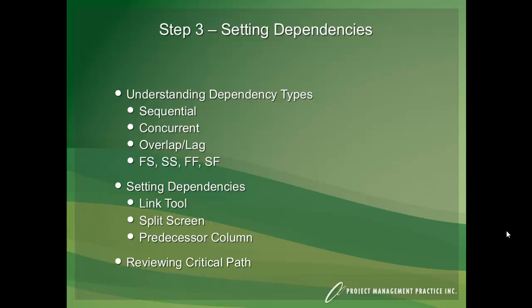You can force things to start at the same time in a start to start relationship or finish to finish. You can even use this rarely used one called start to finish to create a backwards type of link.